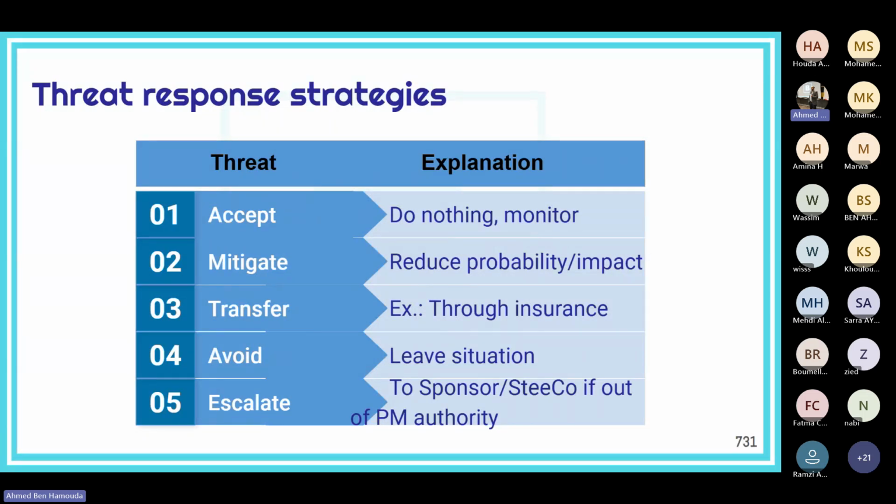It's not 100%, it's not confirmed, so should we do it or not? If we decide to take the action and build that garage, that means we have taken action to mitigate the potential impact. In case we're talking about reducing probability, we will see a few examples later with the different questions.